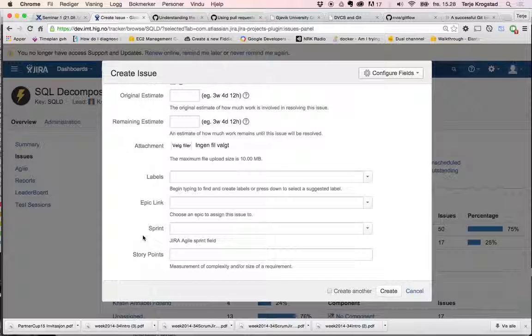Sorry, what do you mean? That means you created the issue at the beginning or in the middle of the sprint. Yeah, if you're assigning it here, I agree. So typically you build your product backlog without setting the sprint here. But when you edit the issue when you're planning your sprint, then you set it for that sprint.